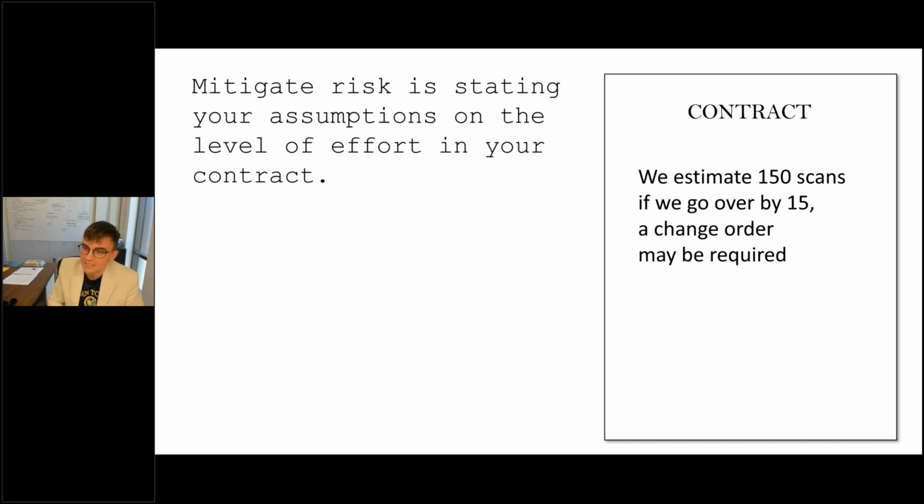And if they allow you, do not hesitate to visit the site, whether it's near your office or across the country. It's a small investment to ensure you do not go underwater on a project because you underestimated complexity. And when very little information is provided up front in the form of floor plans or photos of a space, be guarded. Cover your bases in the contract proposal language.